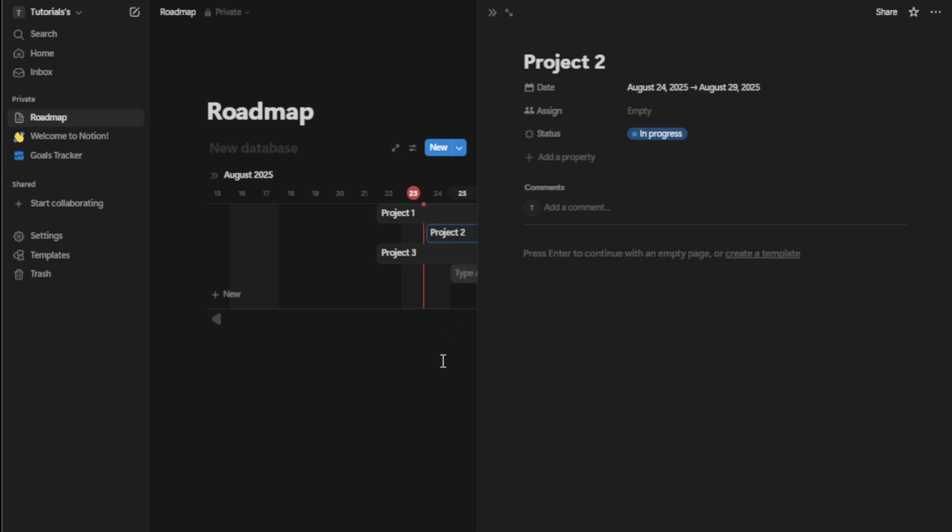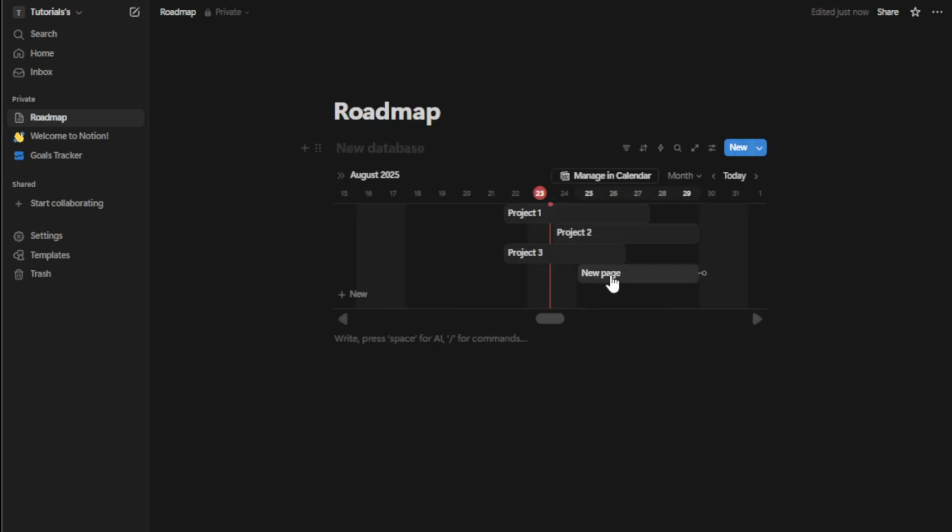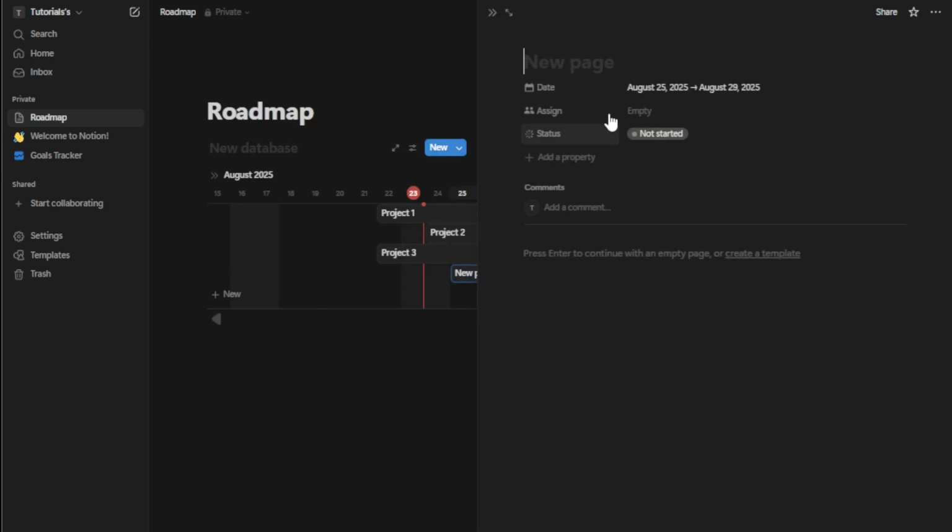and efforts more efficiently. Finally, you want to update progress as tasks move forward. Your roadmap is a living document that should adapt to changes and progress over time. As you complete tasks or milestones, make sure to update their status as well as adjust any dependent dates accordingly.